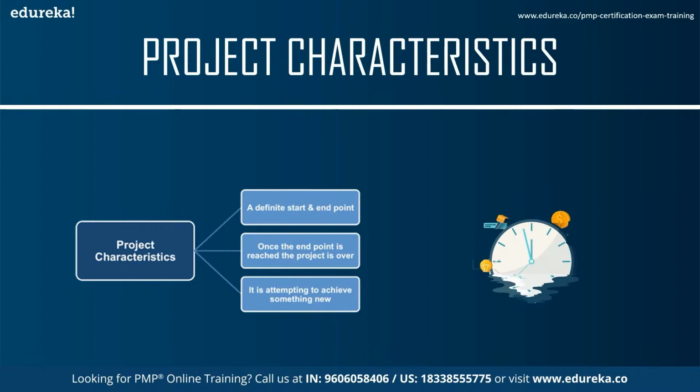So the first question that you would ask yourself is, is it unique? Yes, because the kiosks do not exist in the local grocery stores. This is a new way of offering the company's services to its customer base. While the service the company is offering isn't really new, the way it is presenting its service is. The second question is, does the project have a limited time frame? The answer would definitely be yes. The start date of this project is today and it will end by the end of next year. It is definitely a temporary endeavor.